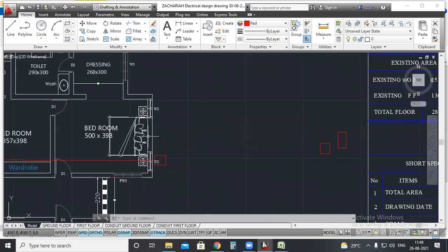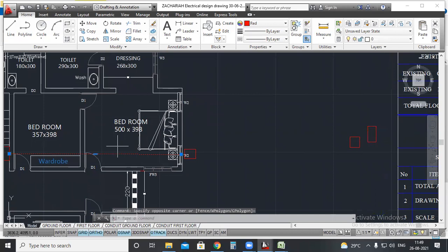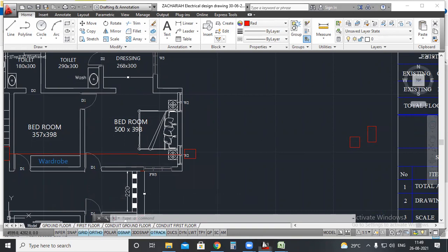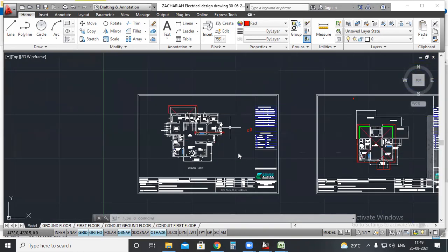If you are having plinth beams being constructed here, before the concreting of the plinth beam, you have to consider the laying of this pipe. So you need to check the drawing. You need to understand all these things initially in the RFI while preparing the RFI. And you have to also ask about the nearest electrical utility pole. For example, if the utility pole is located here near to this building,